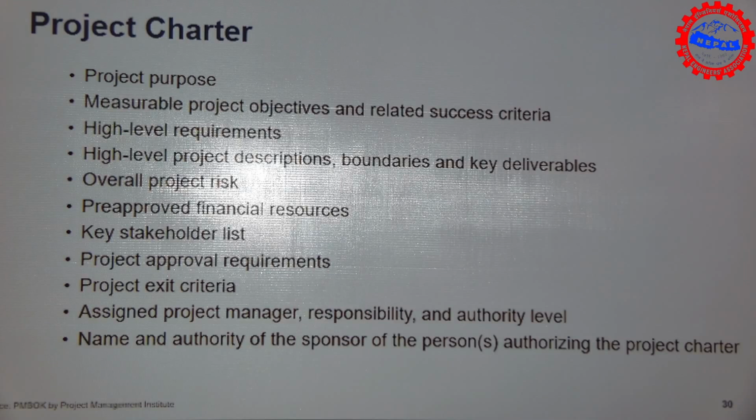I think the majority of projects have their biggest disputes and claims on the scope. In the beginning, we agree, but we have not clearly stated in the document what needs to be done. When the project starts, then it's, no, this needs to be added, this needs to be done. The drawing doesn't imply that this needs to be done. Some things the drawing doesn't make clear, what needs to be done and what doesn't. Some you have to look for in the specification, go to different places, finding different documentation. If it has been stated, then you can find it easily.